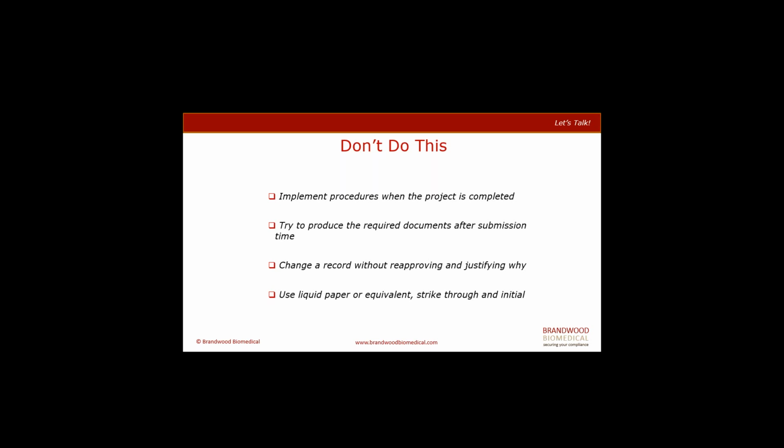The things I like to say not to do, and there's probably plenty more. Don't implement procedures that control the design process when the project is completed. By that point, it'll be too late. And it will also show from a date perspective that the project was well underway long before the actual procedures were implemented.